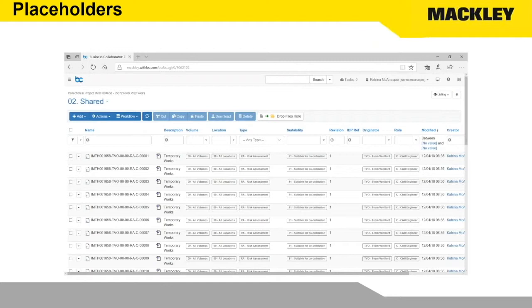So in this case, temporary works designer, he goes in, we can put a description in there for cofferdam, and it could be on a certain site, it could be a plan, elevation, or whatever. He does a quick search, finds the placeholder that he's looking for, and then all he has to do is upload his document into that placeholder.